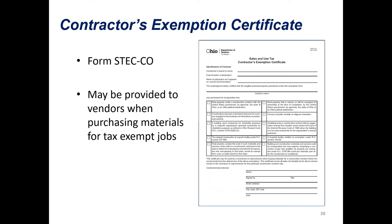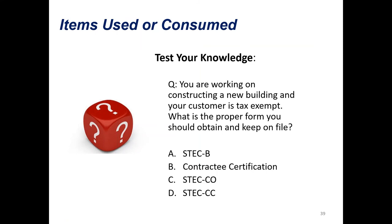The next form commonly seen is the STEC-CO. It's very similar to the STEC-CC except there are a few key differences—there's only a signatory line for one person. If you're a contractor and you didn't get the STEC-CC signed but you know the contract is exempt, you can fill out the STEC-CO yourself without needing your customer to sign it. However, one important caveat: this form does not protect you in an audit situation if you misclassify the job. If it's not truly a tax-exempt job, this form would not protect the contractor. So you want to make sure the job is tax-exempt.